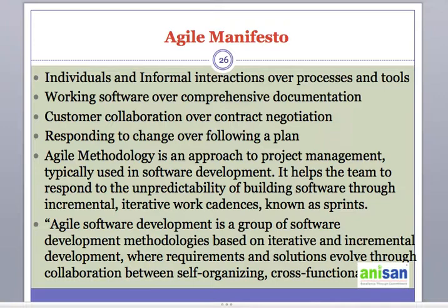The users are allowed to add their requirement or user story at any time during the life cycle, and at the end of the sprint the product owner and the team will reprioritize all the user stories or requirements in the product backlog. It is not necessary when you add a particular user story.